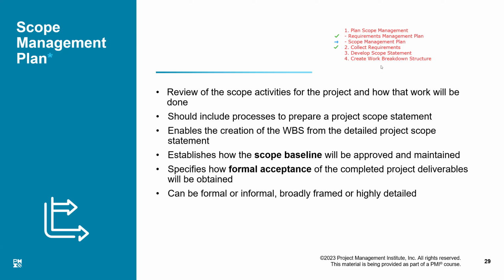We have to present this final shape of the scope in front of the stakeholders so they can approve it. Once they have approved it, we can't change it until, through a change request, approval is sought from the higher-ups and they allow us to change the baseline. Only then can any changes to scope be brought. Anyway, what I am trying to explain here is that we are writing the guideline, or the rules of the game, in the scope management plan.